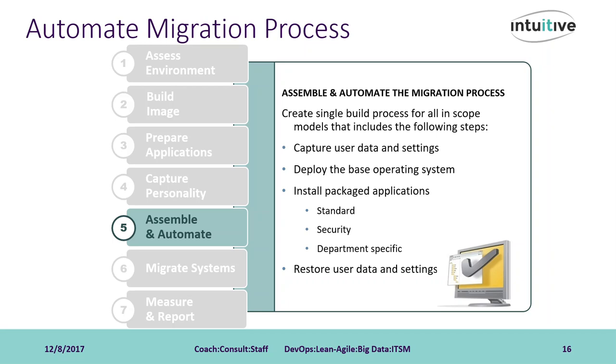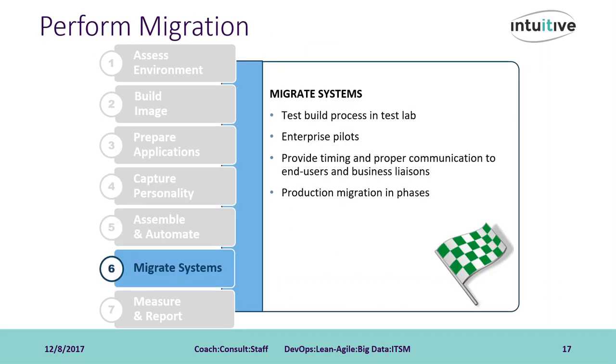One point also worth mentioning here is the phased approach which should be followed. Like with any project, you will want to pilot out the newly migrated image to a few prearranged users from each department and work closely with them to fine-tune the final imaging job before you roll it out during the full migration. So, at the end of this project phase, your image is assembled and automated, ready to be tested as a complete imaging job from Deployment Solution.